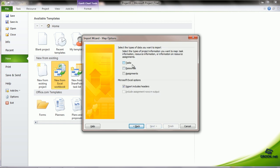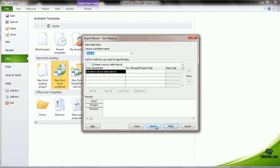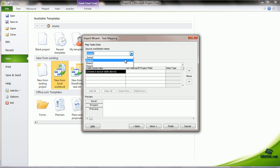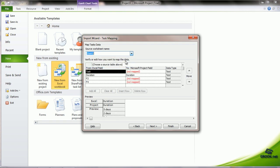It asks us what type of information we want to import: Tasks, Resources, or Assignments. Let's say we choose Tasks. It also gives the option of importing the headers. We click Next. Now, we have to choose the worksheet from Excel, that is Sheet 1, 2 or 3. We say Sheet 1. It shows the two fields that we have in Excel.